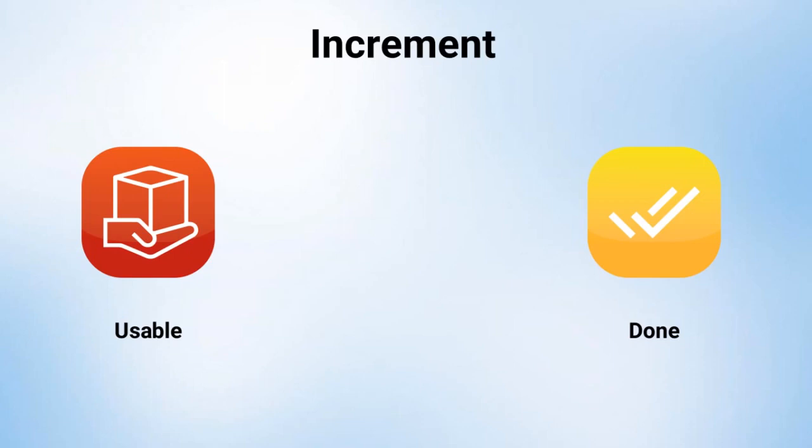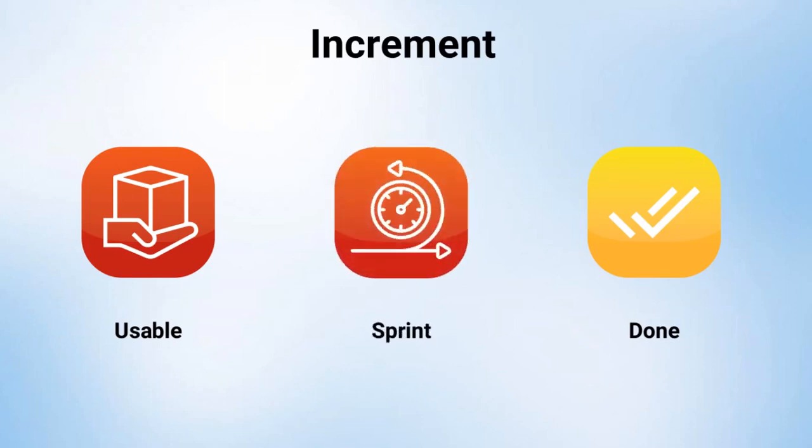In Scrum, iterations are called sprints. A sprint is a time-boxed period used to work on an increment. This time period of a sprint is fixed. Sprints usually have a duration of 1 to 4 weeks, with 2-week sprints being typical. Shorter sprints create an opportunity for more adaptation. Longer sprints allow for more work to be done in a single increment. It's up to each team to decide on the appropriate sprint length.